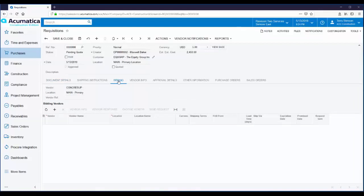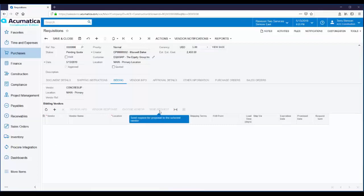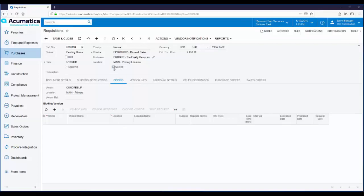Right over here on the bidding tab, this is where you could select different vendors that you want to ask for pricing. And right from here, you can send out requests for pricing. When vendors get back to you with pricing, you can capture those responses. So everything the purchasing department needs to make a selection is all in one place. If it's not necessary to send out bids, I can just click on quoted to indicate that a quote was already received and we're ready to create the purchase order and send it to the vendor.